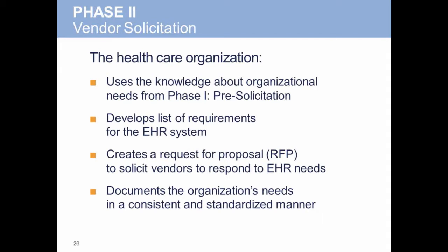Most organizations use a request for proposals, or an RFP, to standardize information received and allow you to objectively compare vendors. An RFP can be as short as 3 pages or much longer, 10+ pages. That's typically for a larger organization.